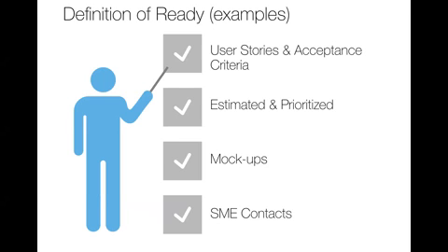It's whatever the team would need as a blanket checklist to say, Mr. Product Owner, we will tackle this story on the first day of our sprint if you provide this level of detail. This avoids causing the product owners to bring stories to the team that are incomplete, and then the team just has to spin their wheels trying to execute on them. This way, they have at least a pretty good understanding of what they're building before they start.